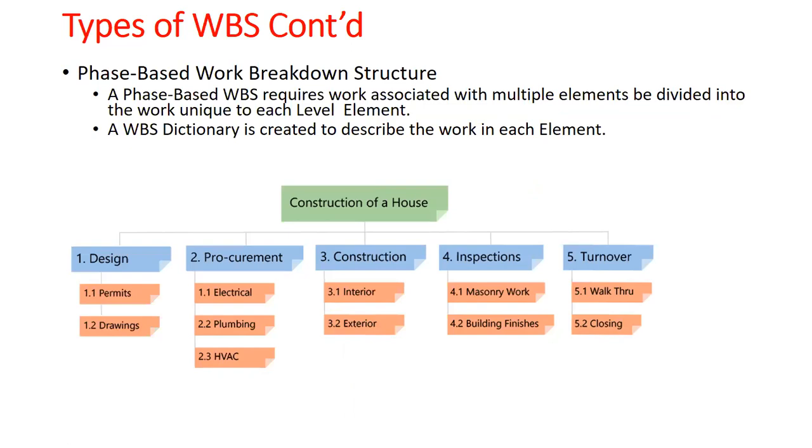Then number 2, get a compliance officer to register for the permits. Number 3, that's 1.1.3. So we are now breaking it down such that by the time we are done with all of the group of work packages under the permits, we could comfortably say we are done with the permit.